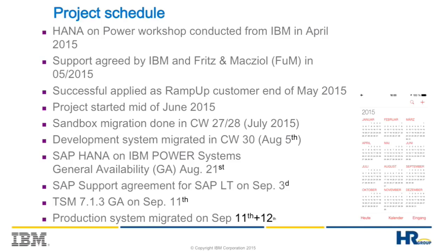So that was really timing and sometimes really hard work inside IBM to escalate so that we get official support as well for the backup solution, because the customer said to us, I cannot go productive when I have no backup solution. And he was already using the backint interface on the x86 appliance, so he doesn't want to change the backup solution on the Power platform.